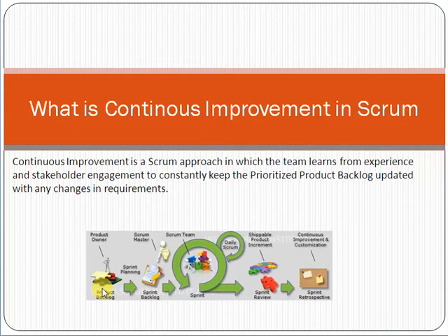For example, if there are 40 tasks, the team can say that there are 10 tasks which we will take from the product backlog, and they will become the sprint backlog. The sprint backlog is the set of tasks which we have taken from the product backlog to deliver in the sprint. So this is called the sprint backlog.